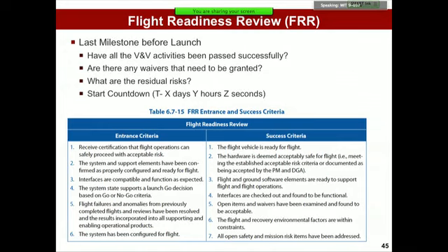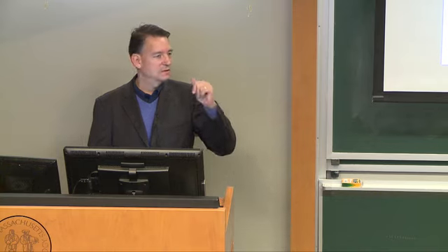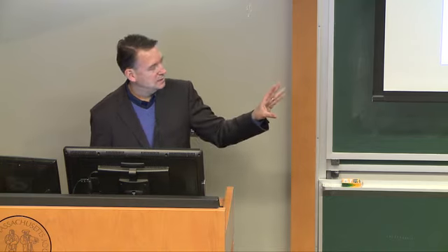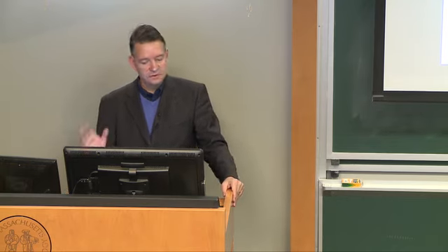And then here's from the handbook the entrance and success criteria for FRR. Everything should have been done at this point. Your design, your integration, your testing, your operating procedure, your people should be trained. This is your last chance to raise a red flag. After the FRR, you essentially go for launch. So the stakes are high.